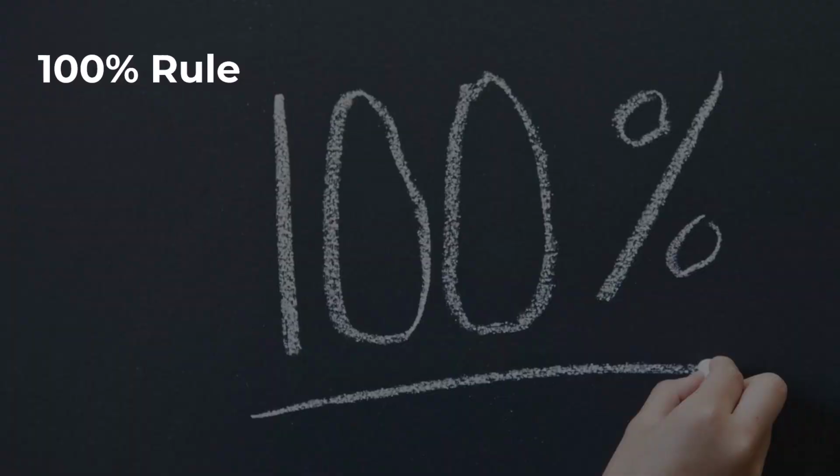And all of this, the creation of the WBS, then decomposing it down into the work packages and creating the WBS dictionary to add all this minute detail, supports an important design principle for work breakdown structures, which is called, you could have guessed it, the 100% rule. It's quite obvious here with the picture on the screen. At its core, the 100% rule states that the work breakdown structure should include 100% of the work that is defined by the project scope and capture all deliverables, internal, external, interim deliverables, in terms of the work that has to be completed.